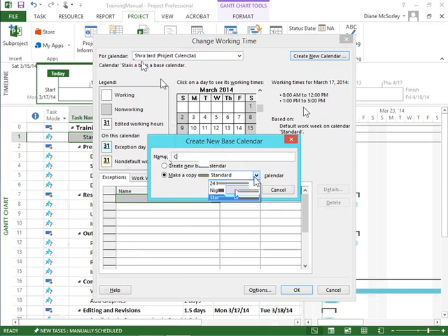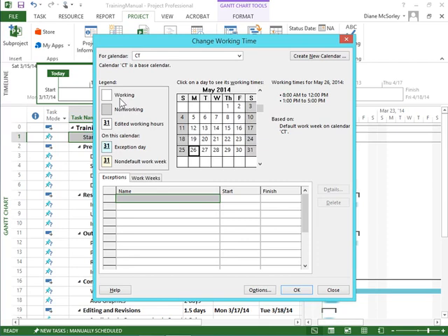So as far as our project goes, let's say this project is going to start on May 1st, so I need to head into May. I can scroll down, find May, and do we have holidays in May? We sure do. So I picked the 26th. You can currently see the color scheme of the calendar. Gray on the weekends, that indicates non-working days. White everywhere else, working days. So right now, Memorial Day, we're working.